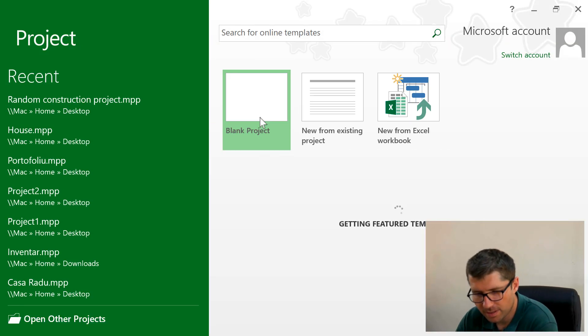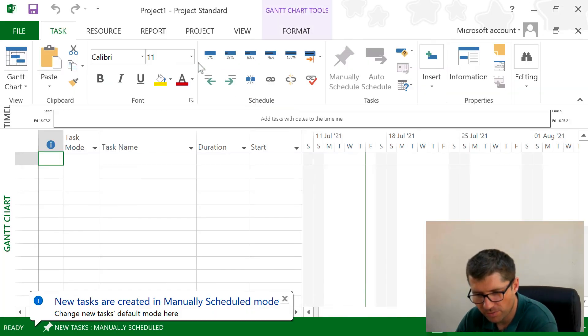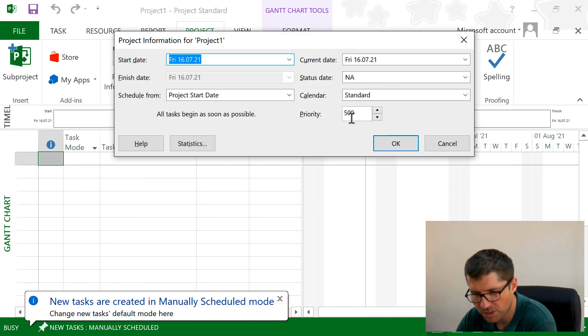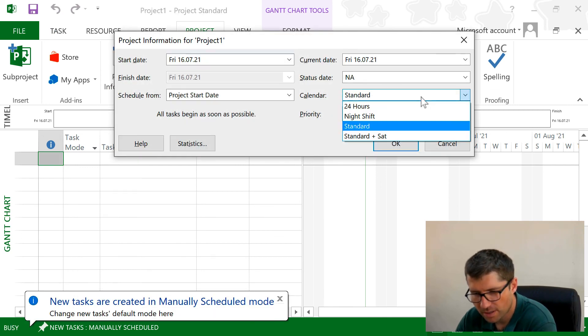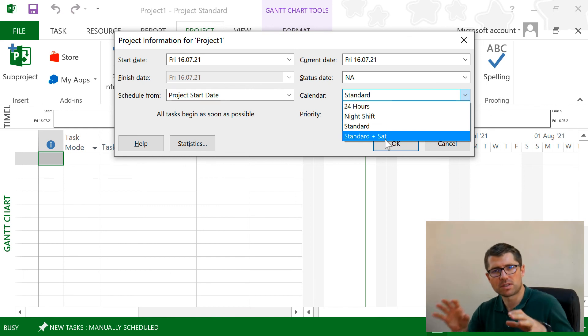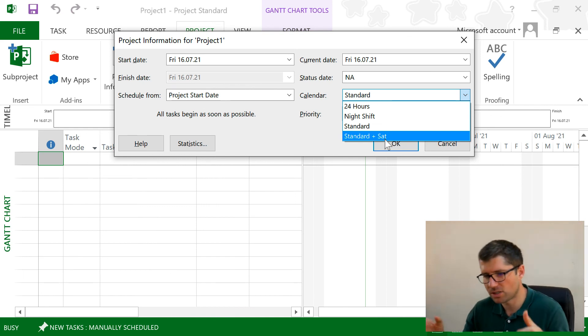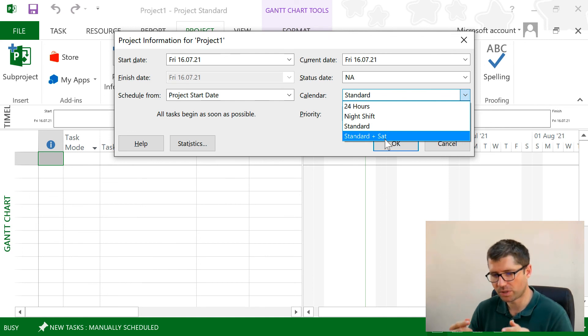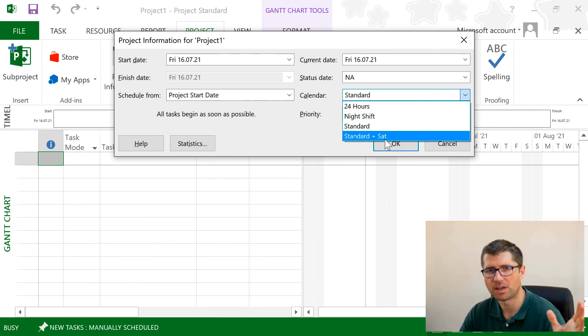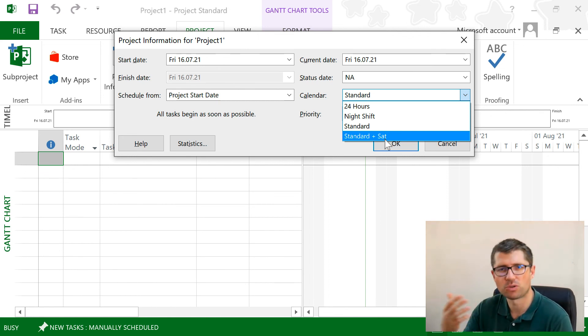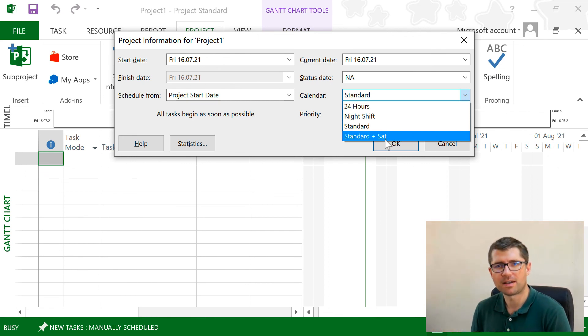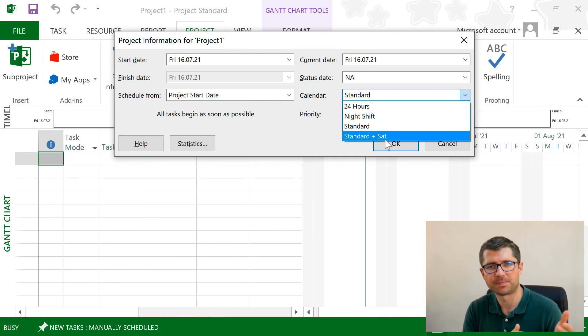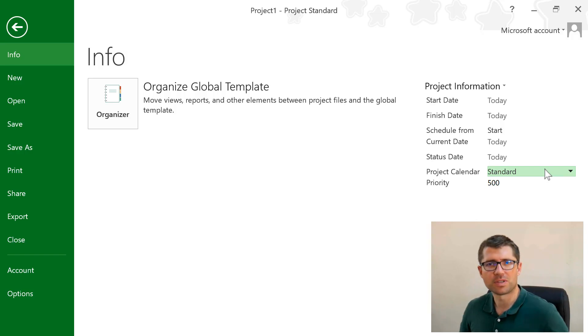Let's see if we can find that calendar over there. I'm going to Project Information. I should see here Standard Plus Saturday. So it's a completely different project I just created, a blank project, but I have access to that calendar that I created in the separate one, without having to do anything else. I just had to copy that into the global template. That was it.